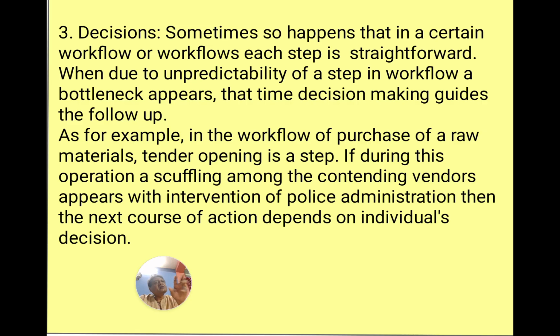A part is tender opening, where the least bidder, this is called the L1 bidder, is determined or ascertained. Who is the L1 bidder? And this L1 bidder is awarded the order to execute the supply of material. So all the vendors are looking very sharply upon who is going to bag the order.